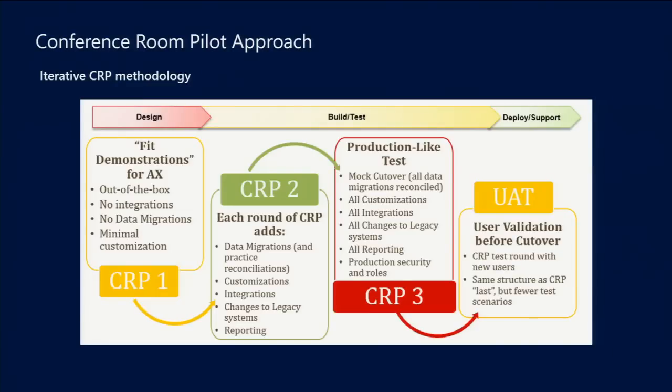What we typically do is that training becomes incremental, so they get learning now, not a whole bunch of things out of context, but learning focused on the context that you're actually working on at the time. In the very end, we end up doing the UAT, making sure the training is for the broad audience because it's not everybody in there. But we try to introduce more people to each CRP because as you get more of the solution, you still have to do the regression pass against the previous capabilities. Now you can actually introduce more users and extend out that knowledge. So it becomes a gradual learning, adoption and awareness, as opposed to a formal training class.